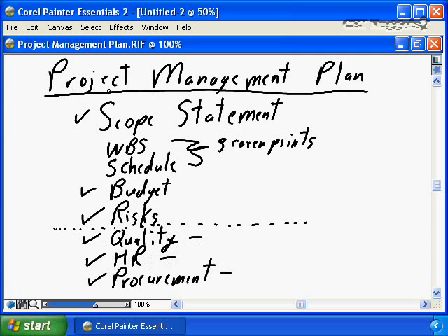All projects need to develop a project management plan. It defines what the project is, how you're going to manage it, how you're going to deliver it. It ensures that you have the processes in place to manage the execution and delivery of your project. All projects need these first components. The remaining components are optional, but need to be addressed as part of the planning process. Don't skip them because you're running a small project. You simply may not need to document them formally in the project management plan itself, for the smaller, simpler projects that involve fewer team members and have less critical impact on the overall organization.